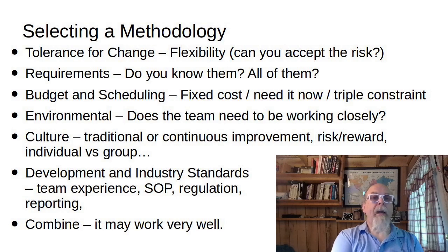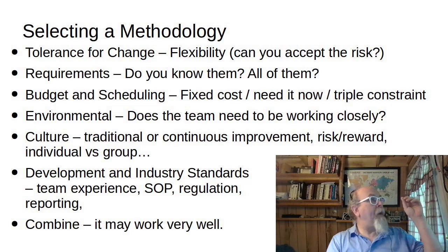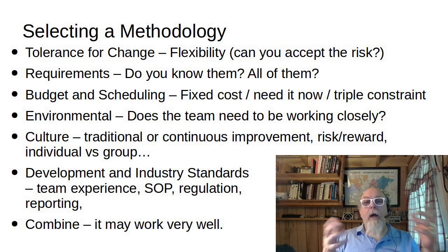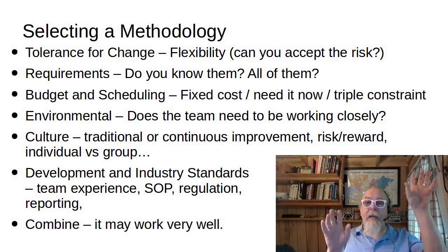Environmental. And I don't mean environmental as in the green, the planet, and all that stuff. Well, it could be, but I kind of mean how is your work environment, your project team? Do they like to work close together? Because if it's a closely working team, then an agile methodology might work better because of the flexibility. Or if it's more of a distributed team, where you've got a group over here doing this and a group over there doing that, then a waterfall methodology might be better because you could assign them tasks.